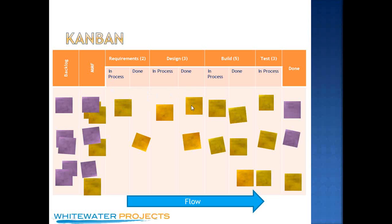Remember how the Kanban card was sent back so that they're pulling inventory in? The same thing happens here. The design people sit and wait until something moves from the requirements group into the done column, and then they pull it. The requirements people finish one and move it over to done, and then pull one from the backlog. So it may look like it's pushing in this direction, but really it's all pulling from the customer end. I apologize for trying to explain Kanban in 15 minutes, but hopefully most of you understand what it is. I have classes where we do several exercises with Kanban.